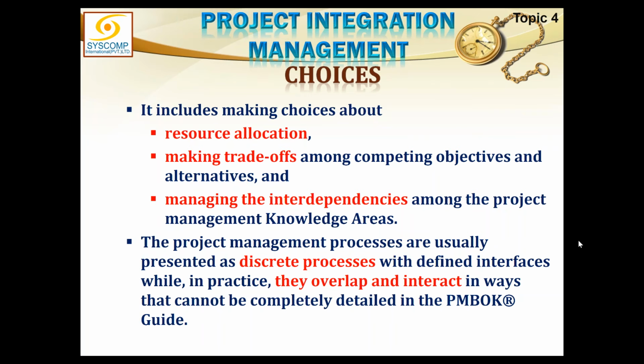And when we are in a fix, we are to make a decision. Sometimes we have to balance among these three objectives. Sometimes time becomes of more importance, and we may have to sacrifice cost on that. We may have to sometimes sacrifice scope. So what trade-offs we are to make, this is to be decided by integration, because integration can look at the things from a higher perspective, from a holistic view, and therefore it can help us decide what to do and which objective has to be given priority.